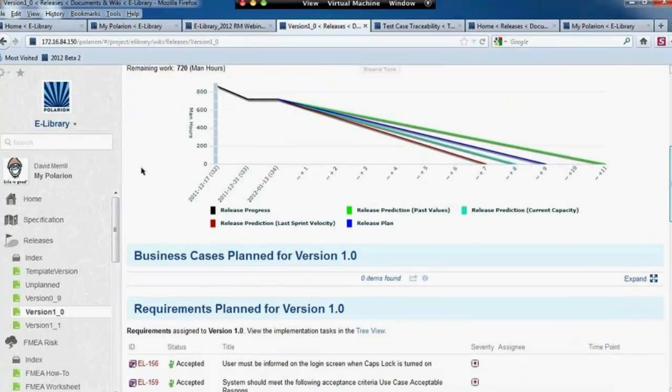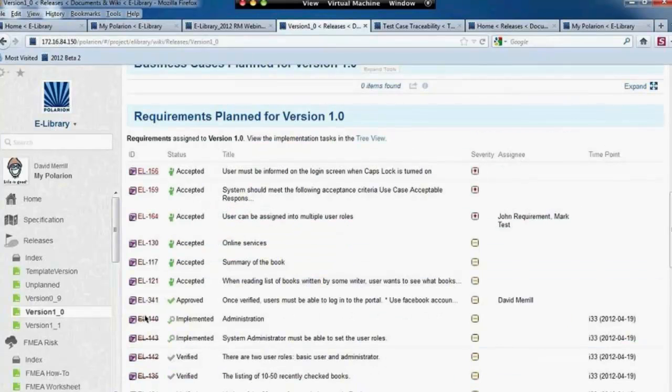And if I come across requirements that seem to be failing test cases, they're too difficult, we can't get it done, then it would be very simple for me to highlight a particular requirement as a development manager, as a business analyst, and say instead of being in release 1.0, I don't know when this is going to get done. So I'm going to unassign it from that release. And I'm going to put the comment in place to say something to the effect of cutting to product backlog. We underestimated this. So this becomes the regular aspect of change that you will be used to working on.